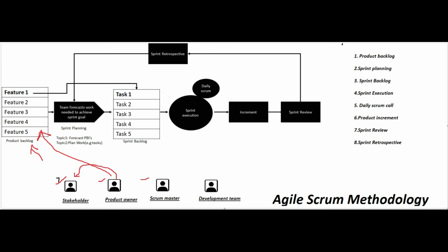The sprint planning will take 2 hours for each week of the sprint. If you are planning for 2 weeks at a time, it will take 4 hours. So this is about the sprint planning. After finishing this stage, it will contain the sprint backlog. So this sprint backlog contains all the tasks to be completed in that particular current sprint.